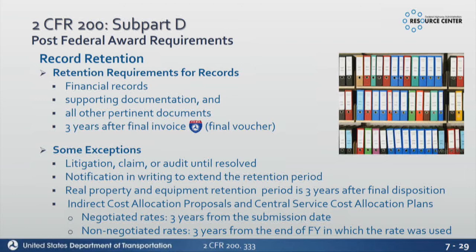So just make sure, and this is where it comes into communication between you and the MPO, because you guys don't do a lot of subrecipients, but you should be telling the MPO, hey, this is your end date. You need to keep your records from this date. So when you close that work program project in FEMAS, there should be a communication from ODOT back to the MPO that says, here's your end date, and now you need to keep your records for at least 3 years.